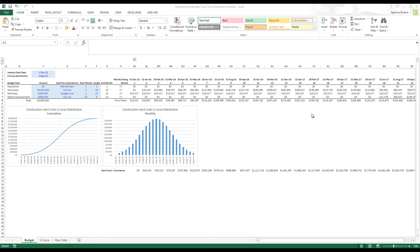Hey there everyone. Today I'm going to walk you through my development budget cash flow distribution module. This is a module — it's not standalone — but it's a way to model project cash flows over a certain number of periods with different methods. One method is manually input: you manually input how much you're spending in month one versus month two versus month three. The second is straight line, where the model takes the total amount for that budget item, divides it by the number of periods, and distributes it evenly.